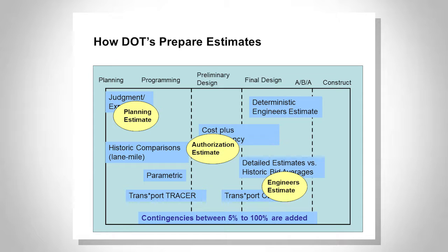Notice at the very bottom, contingencies should, in essence, be reduced as the project gets more refined. Again, it depends on the level of the PS&E quality, the percent of PS&E you give the contractor, and what you're budgeting for based upon your scope.